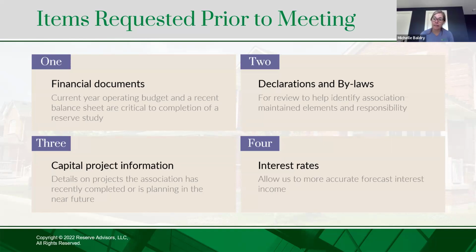But we're going to want to look at those financial documents ahead of time. So we're going to want to review that financial statement to get our arms around that reserve balance, as well as the operating budget. Like I said, we're happy to take a look at those legal documents, so the declaration and bylaws, see if we can gather kind of common elements from reviewing those. Any planned projects that you have underway, if available, if you're in the middle of a project or you've recently signed a contract for some upcoming work, we would like to take a look at that so that we can discuss it with you during that kickoff meeting.